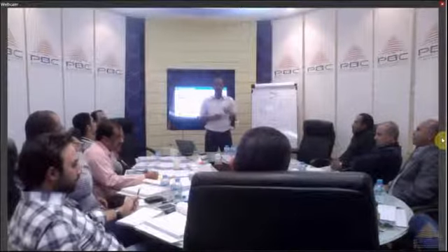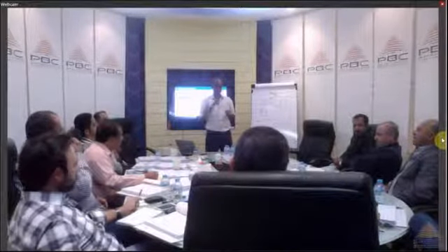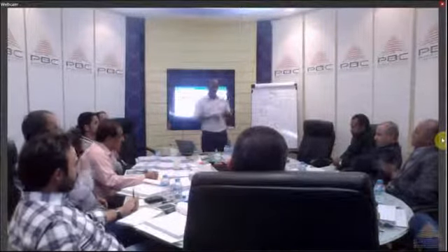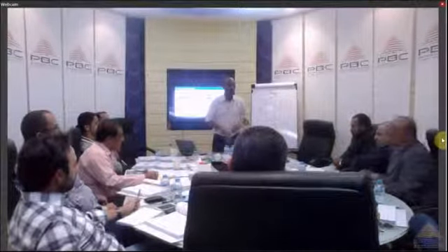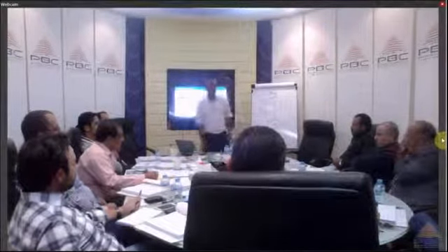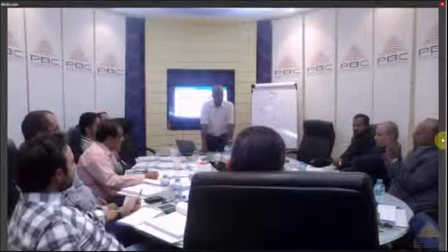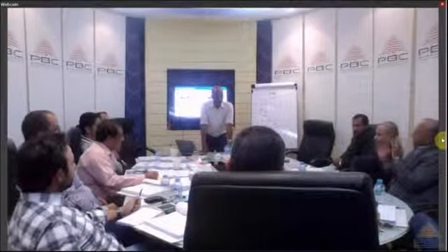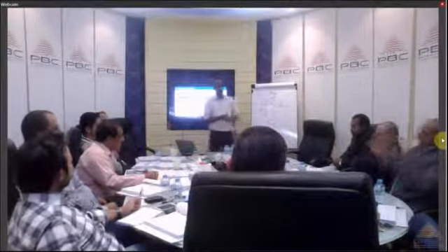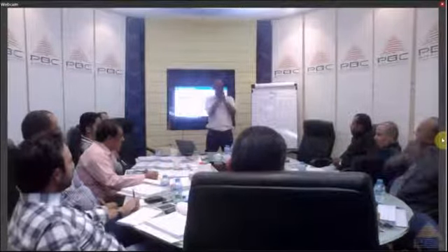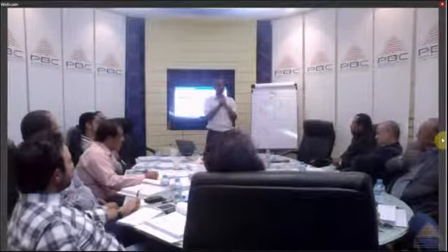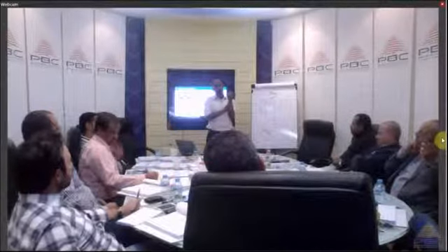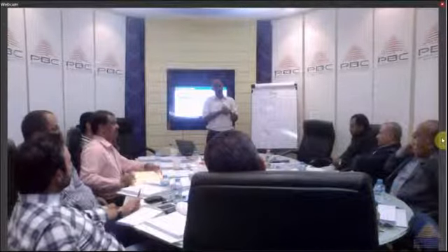Okay, let's hear it. It depends on the nature of the activity. For example, block and plaster: finish to start? No, I disagree. For example, I can have start to start: I start block in some area very early, so I can start the plaster partially in this area.